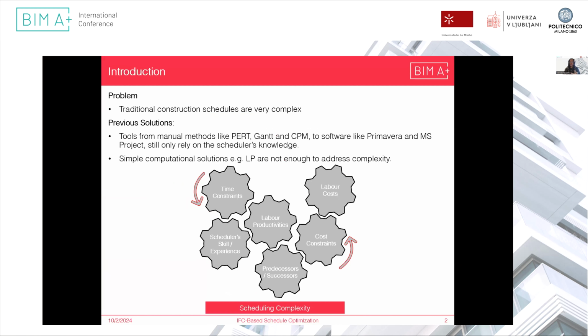time constraints and cost constraints, which must be kept to a minimum. And in addition to this, we have labor costs, we have labor productivities, and all these are usually put together depending on the skill of the scheduler and their experience. So the same resources handed to two different schedulers will result in two different schedules.